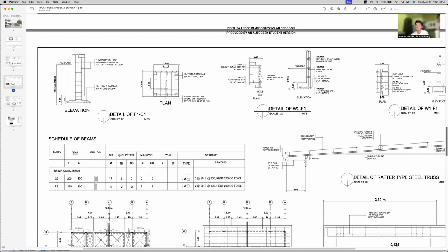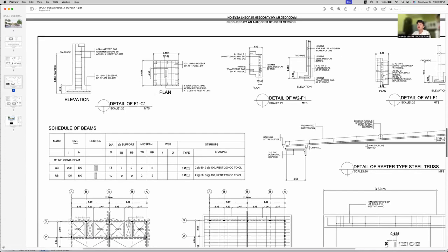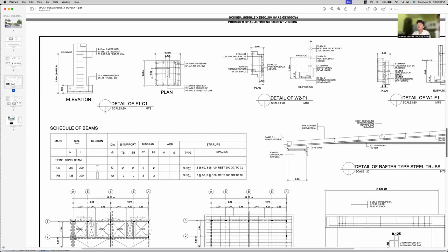So since the thickness of the column is given and its overall dimensions as well, we can then estimate the number of plywoods used. By utilizing the thickness of the footing and its width and length respectively, we are able to acquire its area.